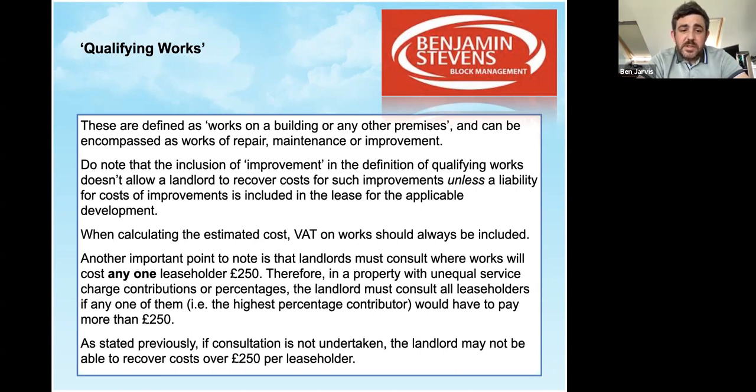So we must consult all leaseholders if any one of them, so that, as I say, the highest percentage contributor would have to pay more than £250. So that's really important as well. If you haven't done so already, look at your portfolio and look at the kicking in points, look at the highest paid percentage and work out from there what your kicking in point for Section 20 would be. So then the block managers or the senior manager teams can always have a good handle on what is likely to be Section 20. So you don't run into an issue where, in good faith, you've placed an order for something like a replacement of door entry, and you've done it with all good intentions, but you actually encroached on the kicking in point without realizing.